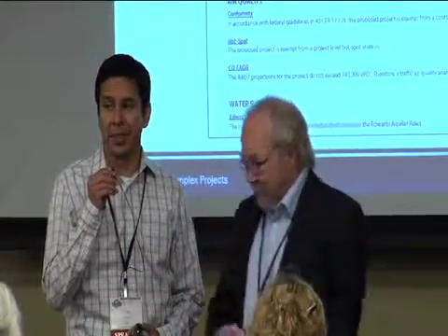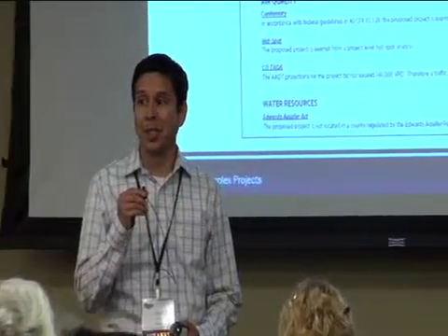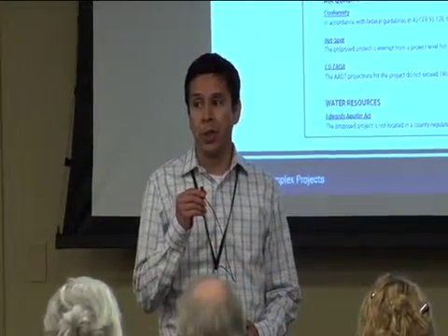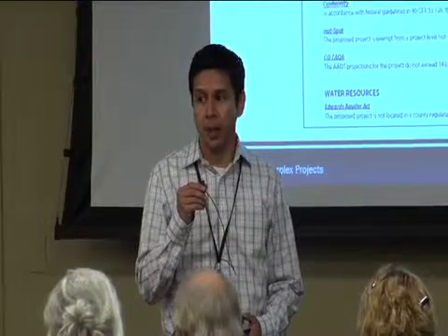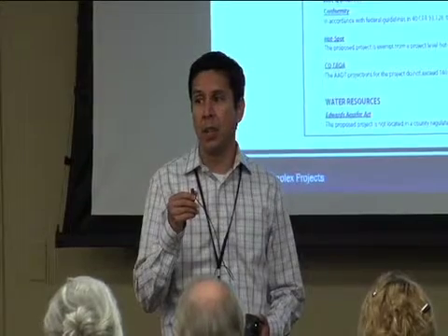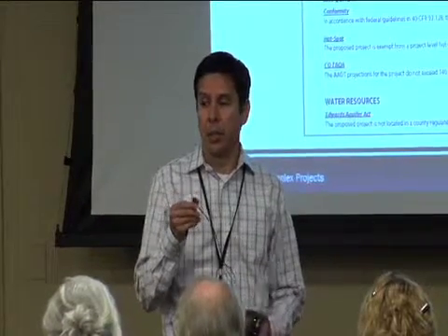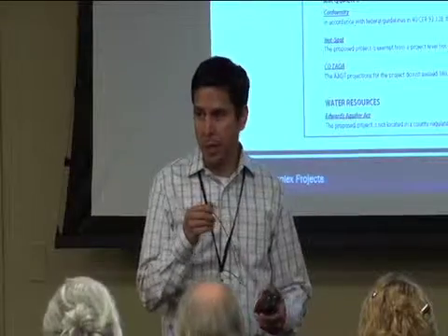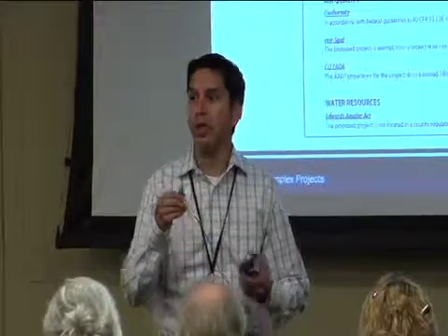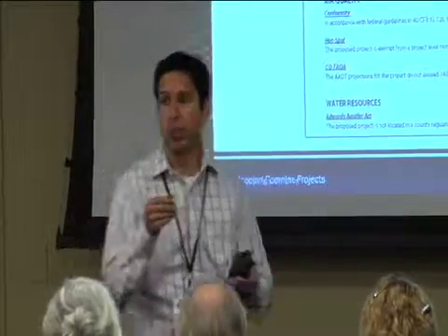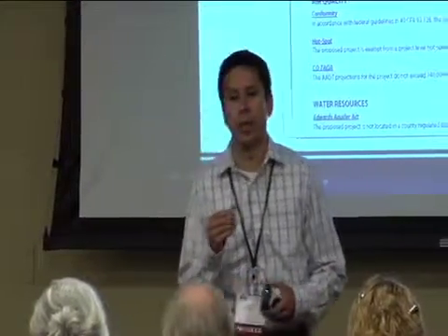And I guess to elaborate on how that process is going to look like, if you're thinking that your project can meet those criteria, get a hold of project delivery, we'll discuss it, and then there'll be a classification request letter that comes through to us, and then our signature authority as a delegate, somebody at ENV, will determine if it's appropriate, and then we'll approve that approach. And then it becomes part of the district's responsibility at the CE level.